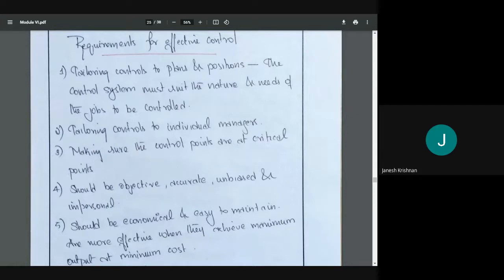Then, how are we controlling this process? We have certain control points, that is, important junctions. If we are talking in terms of civil work, concreting is a very important step whenever you are doing construction work. The inspection will always come for the concreting, so concreting becomes a control point, making sure the control points are critical points.